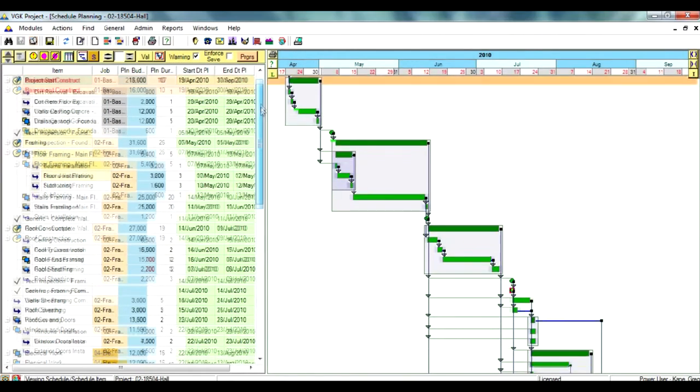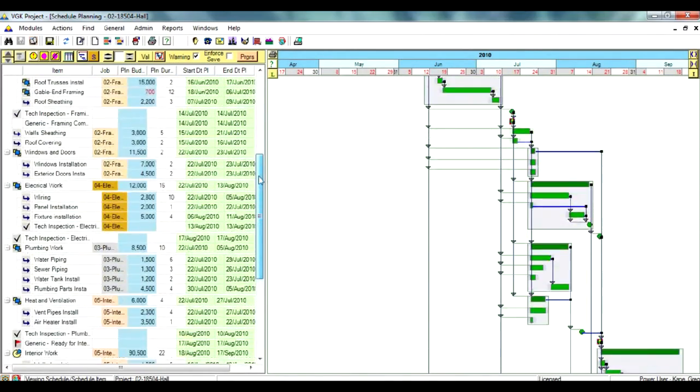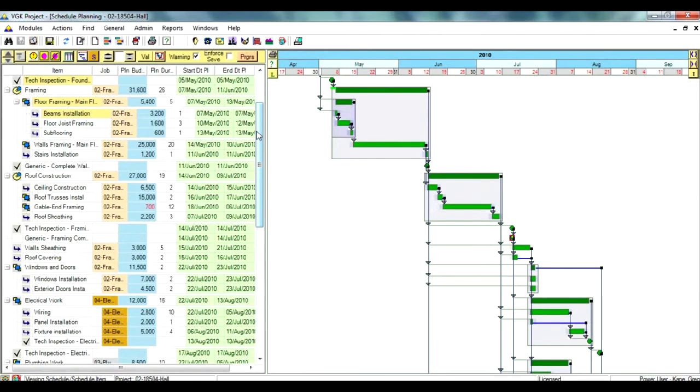You can quickly develop a schedule from individual items or use tools called templates and schedule blocks. By using a template, you can import a complete schedule with a single step, which of course saves you a lot of time. Schedule blocks are templates which contain a section of a schedule, so you can quickly assemble a schedule by combining various schedule blocks with each other. This approach provides you with a great level of efficiency and flexibility.